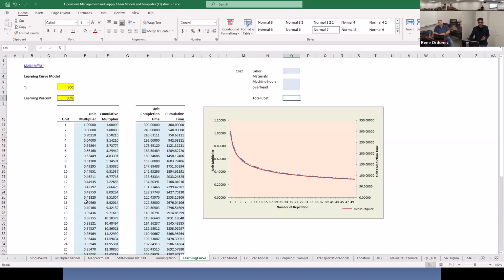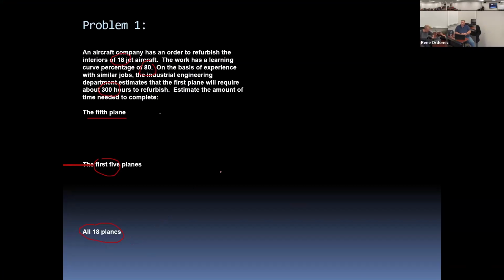On the other hand, if you overestimate your labor component, your labor cost will be high. Your direct machine hours will be high. Your overhead will be high. Your total cost will be high. Your bid price will be high. You won't be competitive. Okay? So there lies the importance of understanding your labor cost component, especially in projects that are labor intensive. Okay? So we've done this.